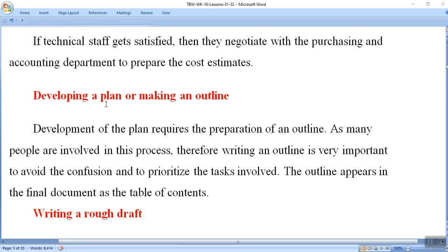Management people will write the major steps, how much time each step requires, and according to this time and nature of work, how many engineers they require. They will ask HR to hire more engineers, experts, and laborers if needed, fine. That is called the management plan.